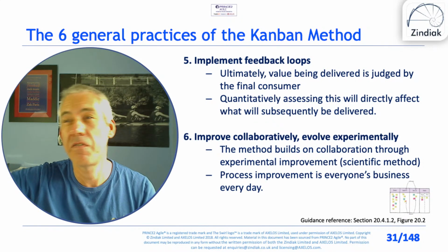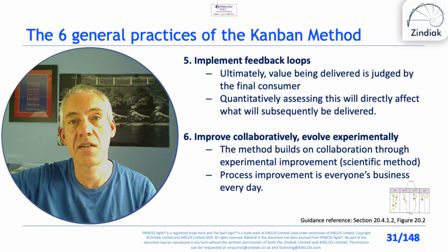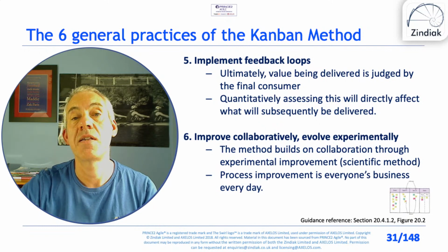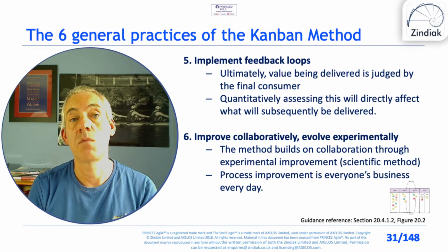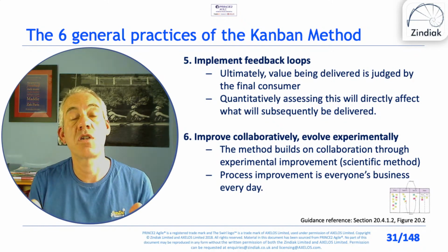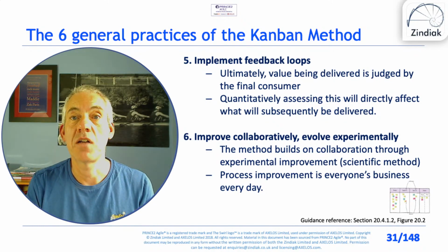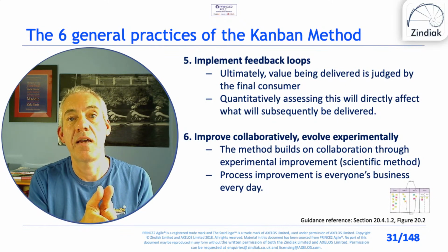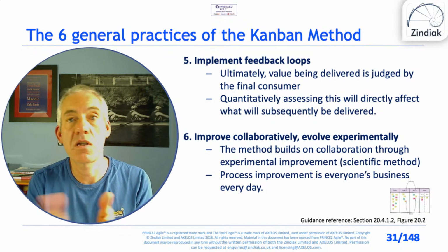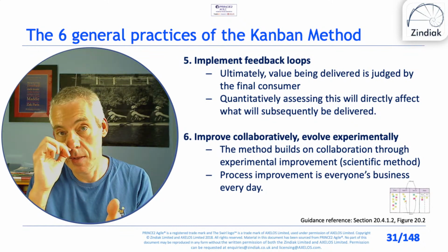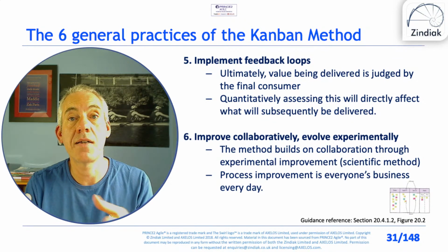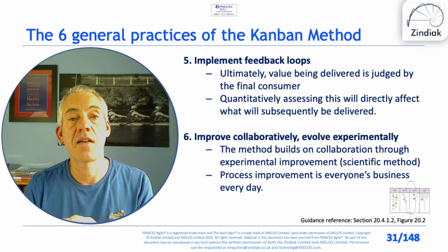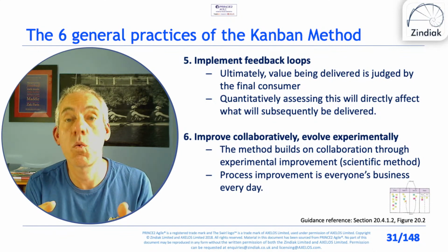If we've got a vague idea of what we need in terms of what, and we've kind of no idea how, that's where experimentation, creativity really comes to the fore, and where the time-boxed approach really works well. So we are going to spend one sprint on a spike, on a prototype, an experiment, to see if our idea for how we might deliver this thing is going to work. And that's what we're prepared to risk, really.